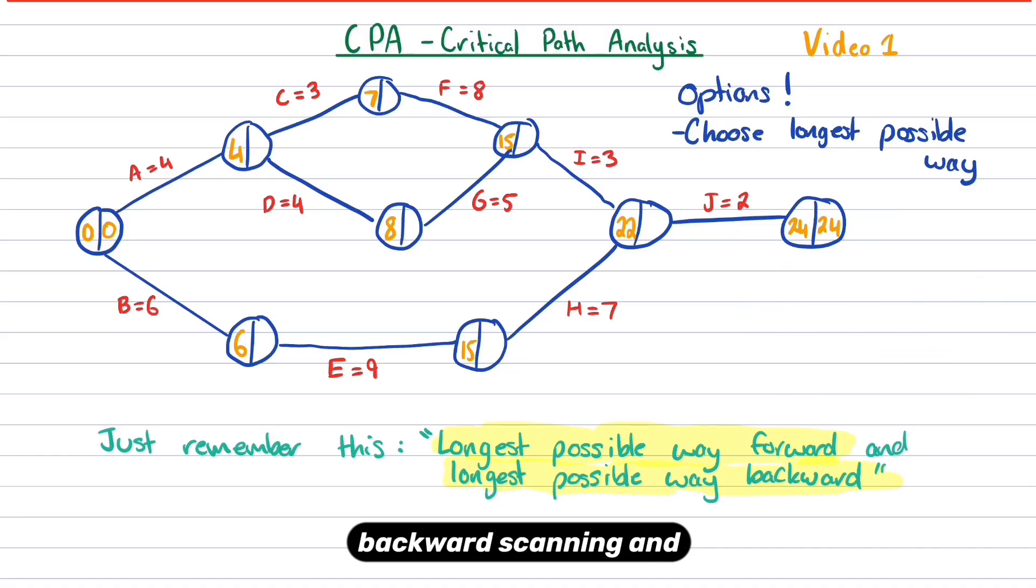Now we're going to begin backward scanning. And backward scanning, we're going the longest possible way backwards. So obviously there's one option for the first part. It's going to be 22. And when we go downward, there's only one option because there's only one path going that way. So we're going to do 22 take seven, which is 15. And then same, if we keep going along, we've just got one option. So 15 take nine is six.